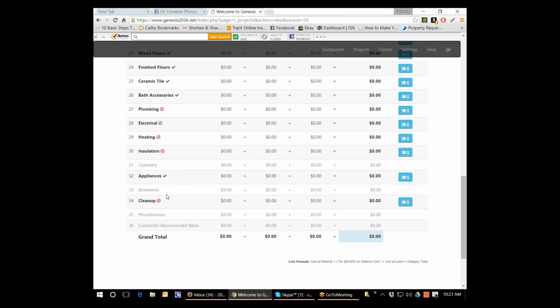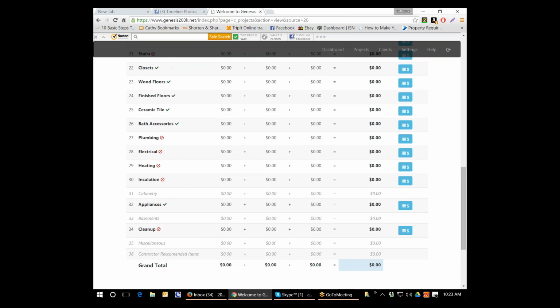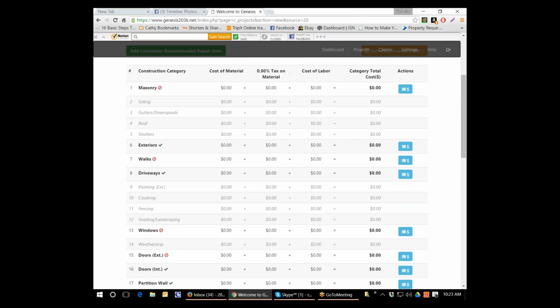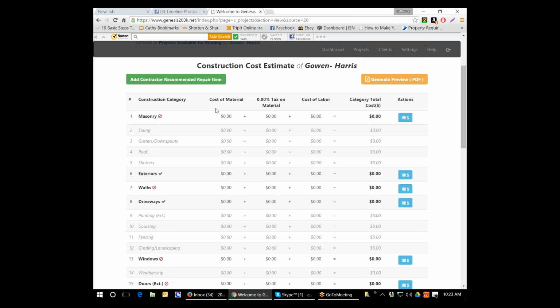Note, until you have checked off every single category that is bold and that has a blue box next to it that says provide estimates, unless you put a labor and material number next to all mandatory items in every one of these sections, you will not be able to go past and submit your bid. So here I will just sample this information for you.